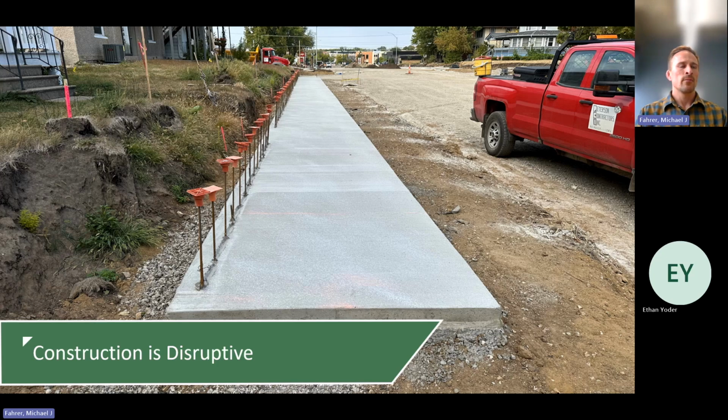So this is really the first pour where they have the flat portions done. They'll come back and pour the vertical portion, and then for Court Street, they're putting a limestone veneer on. So that will then happen, and then they'll have a concrete cap installed on top of that.